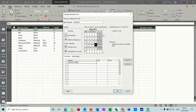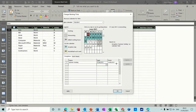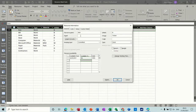Exceptions is where you can put holidays. Let's put a summer holiday for Bob — he can go on holiday from the 1st of June till the 14th of June. If you allocate him over that period he'll come up as over-allocated. You can see his calendar is blocked off there, and if you click on Friday it tells you the times he works on Friday as opposed to Thursday.